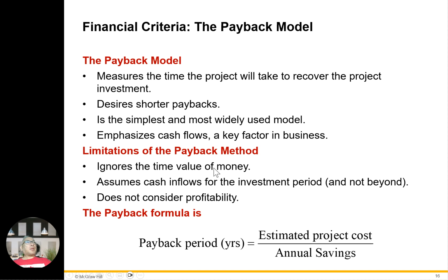So my apology. Limitations of the payback period: it ignores the time value of money and assumes the cash inflow of the investment. It does not consider profitability. The formula: payback period equals estimated project cost divided by annual savings. This is a typical payback model.